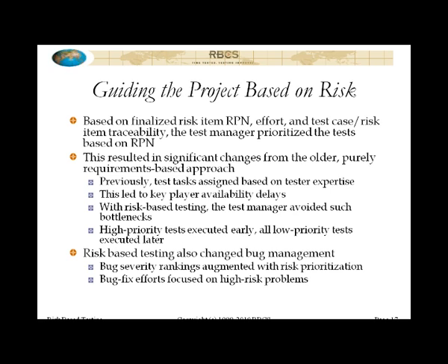Before, what had happened a lot was that the tests were assigned to testers based on their experience, like who's the most qualified to run this test. Well, what ended up happening was you had a handful of people who were the key players, had the most experience, and of course they ended up getting most of the tests assigned to them. Unfortunately, not just most of the tests, but almost all the important tests. So what that ended up doing was delaying the running of important tests, and thus the discovery of important bugs, really late in the project.